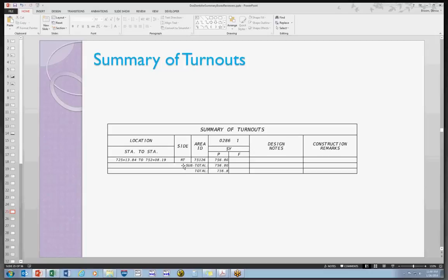When it originally got started, there was a subtotal, a total, a plan total, and a final total. The final total has since been taken out, but I would not mark that up. I mean, you may comment on it, just for informational purposes, so that the next project they go to, they know that this formatting has changed. But I wouldn't make them redo it if they used one of the original templates, because it's just redundant information. I have a column for that final total and I don't need it twice.